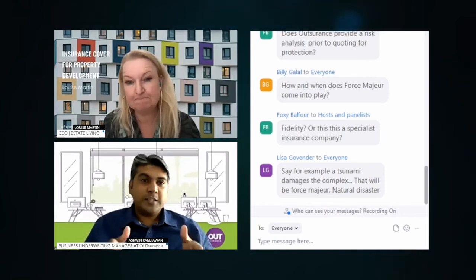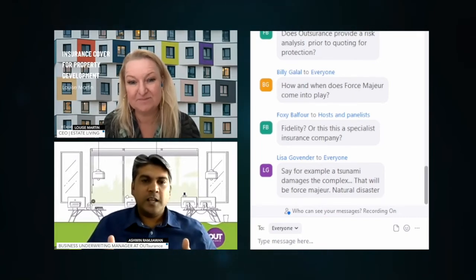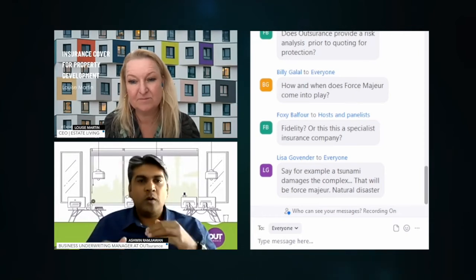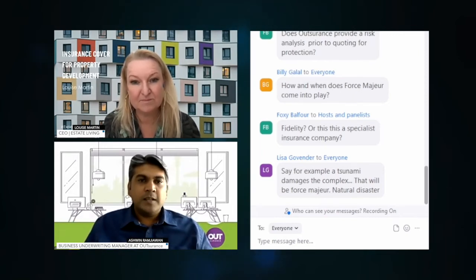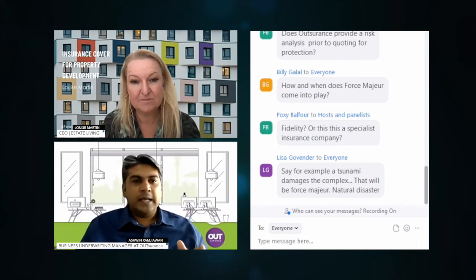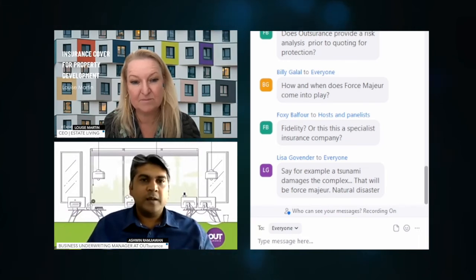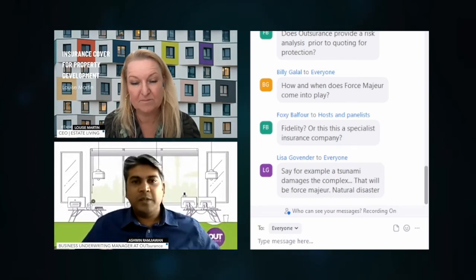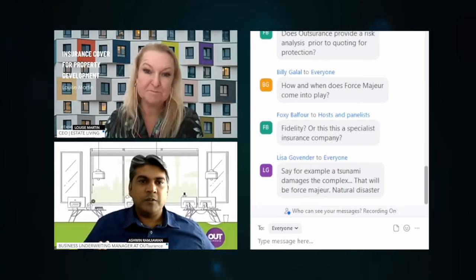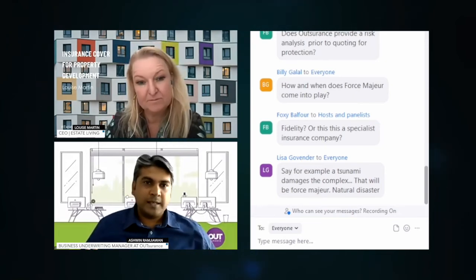I think because the contractor is who we're covering, hypothetically, in an engineering product like contractors all risk. So if there is probably works damage at the premises when the claim is lodged, and let's use an example, that maybe while a wall was being built, the wall collapsed, maybe because of heavy rain or so. Remember, one of the underwriting requirements on that contract would have been to supply your bill of quantities, for example. So you can quickly quantify the loss by saying 10 meters of boundary walls collapsed. Based on the bill of quantities, you can put a costing to that damage.